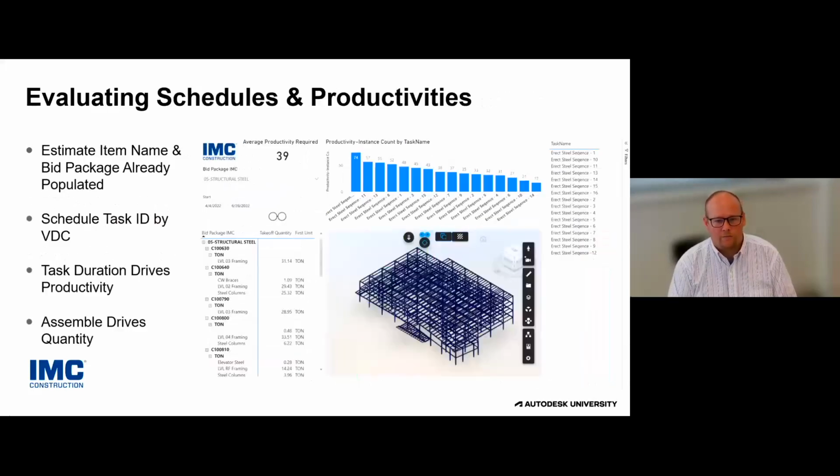And next slide. So the last one that we're starting to explore a little bit is being able to connect the model to our schedules to really start to understand what is the productivity that we're asking some trade contractors to start delivering on some of these projects. And ultimately, what is the variance in the productivity or the standard deviation between any structural steel sequence, any different scheduled activity, just overall, what is the difference that we're asking? So if you look at structural steel, it's obviously piece counts per day.